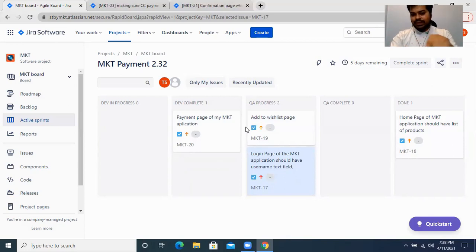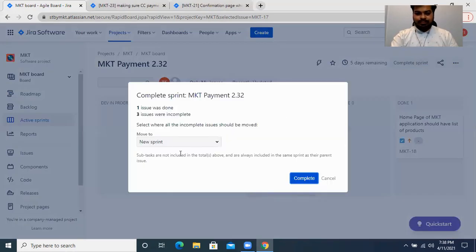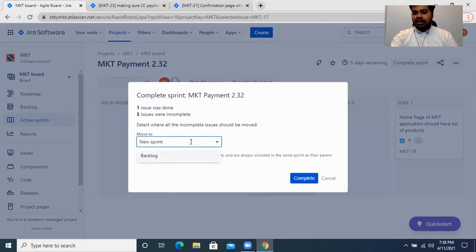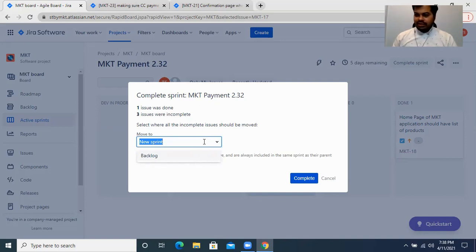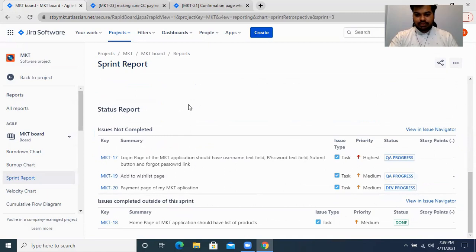Those three tasks will come back to the next sprint with the same states they were in. So if one task was in 'Dev Complete' and two were in 'QA In Progress,' they will retain those states in the new sprint, which will be named 2.33. When you click 'Complete Sprint,' it tells you that one issue was done and three issues were incomplete, and it asks whether you want to move those tasks to the new sprint or back to the product backlog.